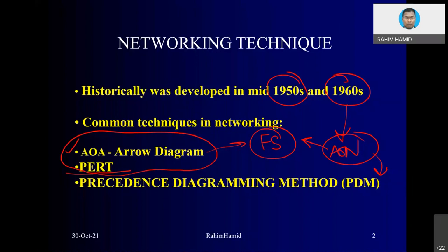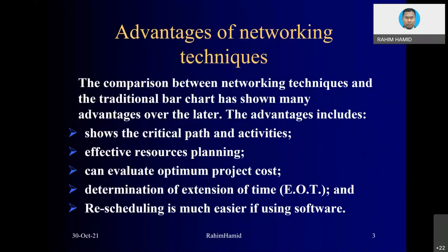Advantages of network technique. Network technique allows us to show the critical path and critical activities. This is perhaps the main reason why we want to connect all those activities: to figure out which ones are on the critical path. For what reason do we want to know the critical path? Well, the critical path indicates the longest duration among the different paths of the network diagram, and eventually it determines the project duration. So the project duration will follow the critical path, the longest duration.